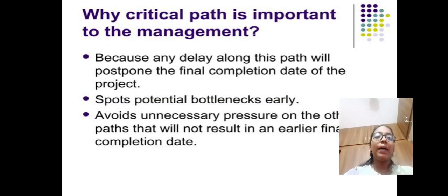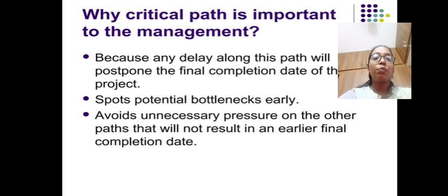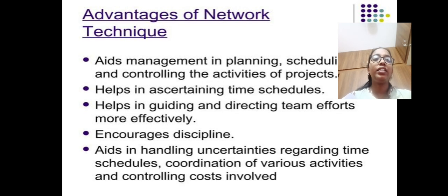Why is the critical path important to the management? Because any delay along this path will postpone the final completion date of the project. It spots potential bottlenecks early and avoids unnecessary pressure on other paths that will not result in an early final completion date.